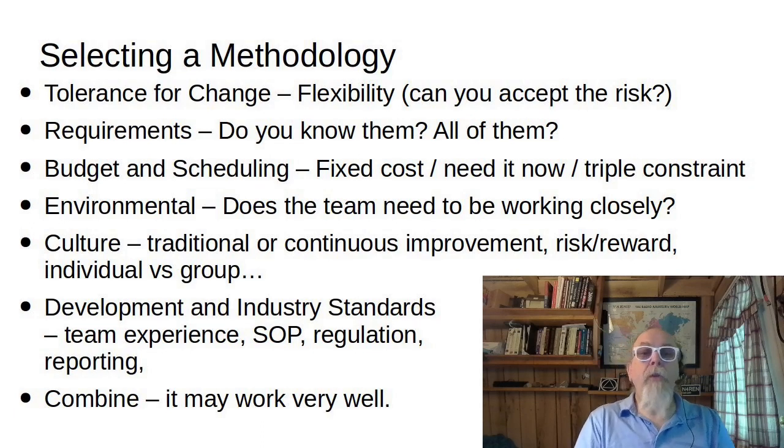Do you know all of the requirements? If you don't know all the requirements, waterfall will fail miserably. So if you know all the requirements up front, then waterfall might be better for you. Budgeting, scheduling. If you've got a fixed cost, then waterfall might be a better idea, because you can design it in detail, figure out what the cost of all the pieces are, add all of it up, and come up with a good estimate.